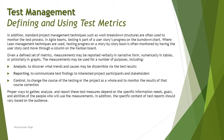Lean management techniques are used where testing progress on a story-by-story basis is monitored by having the user story card move through columns on a Kanban board. In agile methodologies we use Kanban or scrum boards with columns like To Do, In Progress, Verify, and Done. Cards move from column to column to reflect progress, and once acceptance criteria is met, the task is marked as done.